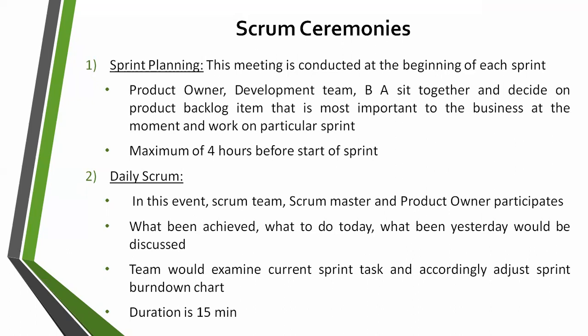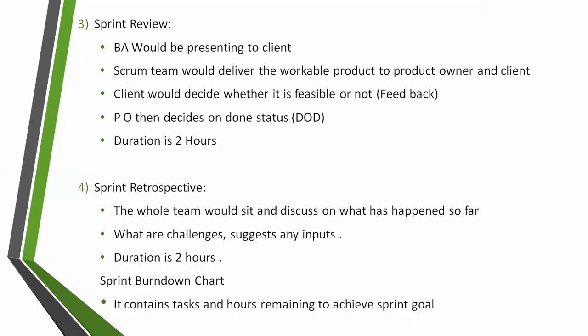In the sprint review, will the client also participate directly with us? Yes, obviously, whatever work we have done, generally the product owner would present it to the client. Who are the participants? The Scrum team are the participants: product owner, Scrum master, development team, business analyst.